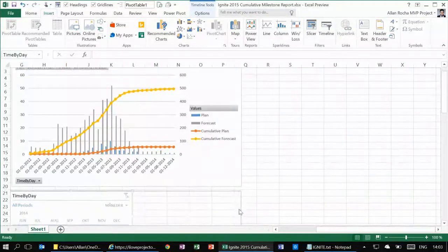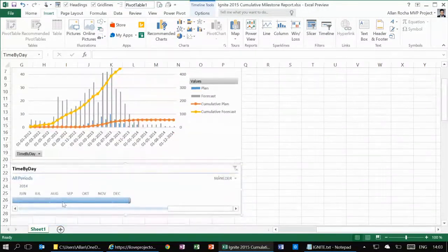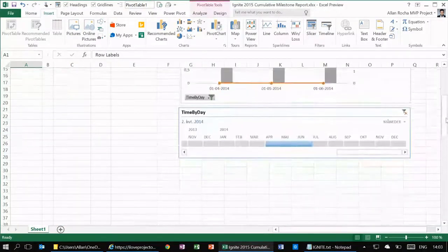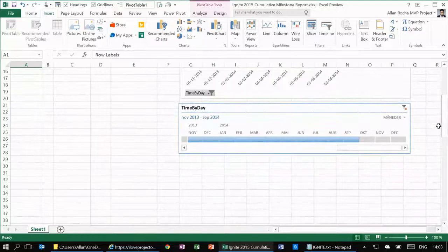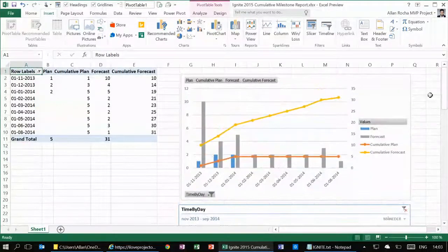Great. All right. Good timing. Excellent. That was perfect. So as you'll see, we now have a report. While you were talking, I was doing all the work, which is the way it usually works for me. Here, let's get some data. And if we look at this, what this is showing us now is total number of tasks planned versus total number of tasks that are currently estimated. So it's showing me basically an aggregate view of my schedule across all projects, and I can start to see if my forecast is slipping. Again, a very basic report. You don't need financials, you don't need earned value, you don't need resources. We're doing a straight up count of how many tasks should have been completed in a given month.